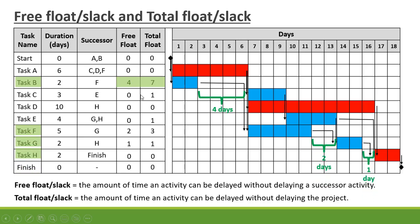Task B is also connected to F, F is connected to G, and G is connected to H. Task F has a float of 2 days, and G has a float of 1 day. So the total float is 1 plus 2 plus 4 equals 7 days — there is a 7-day total float on Task B.